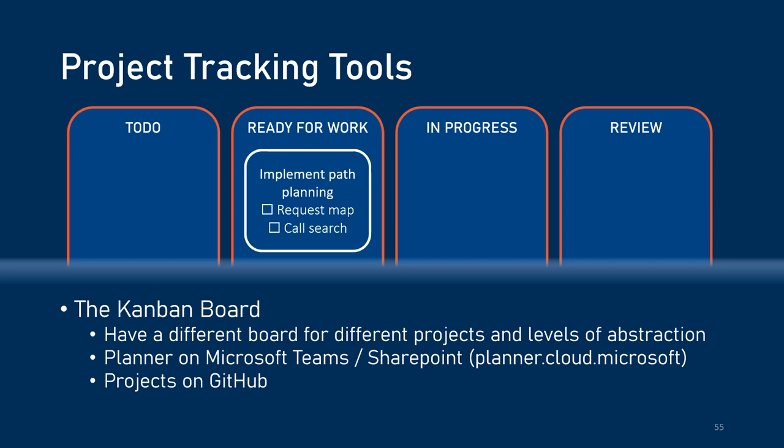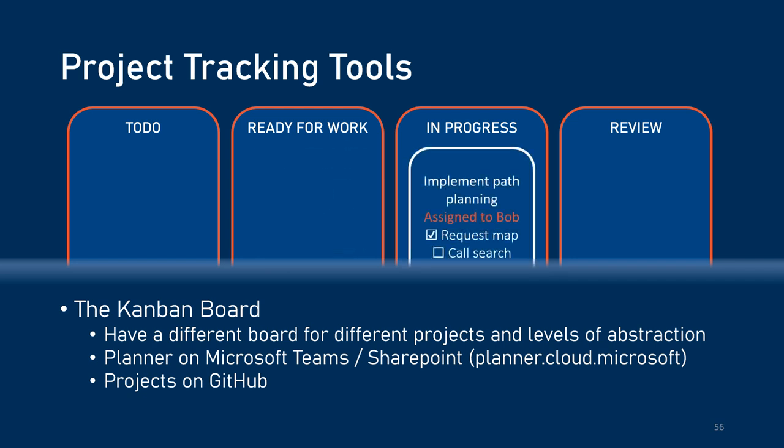Then you move it to the Ready for Work bin, and at this point you should have it more well-defined. For example, in the case of path planning, you might want to be able to request a map of our environment and also be able to call search functions so we can look through that environment. We've got these checkboxes here. Once you've got it ready for work, you can assign it to someone, and at that point it's In Progress. Let's say we've assigned it to Bob, and you can see here that he's already checked off the request map component of this action item.